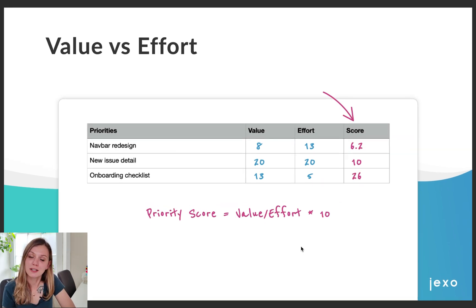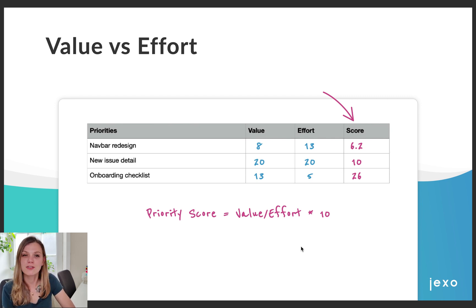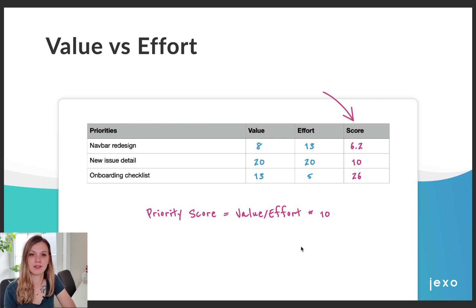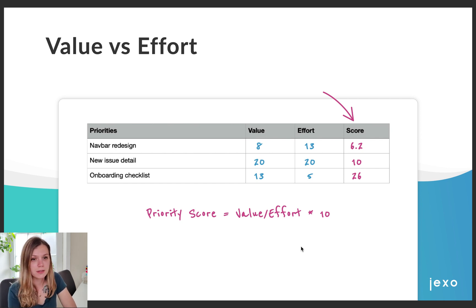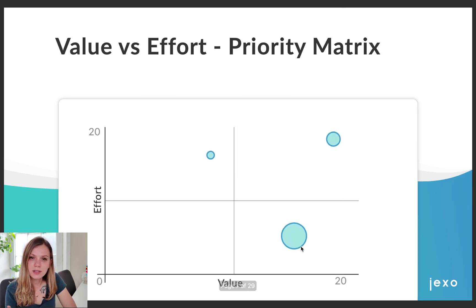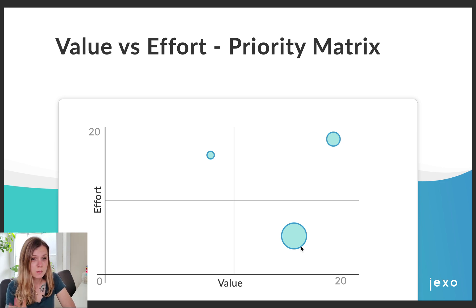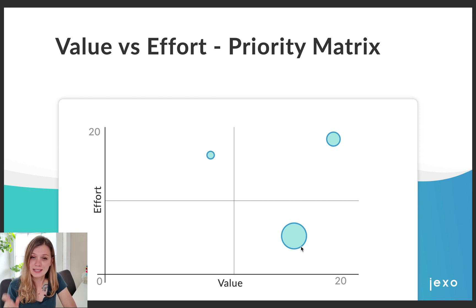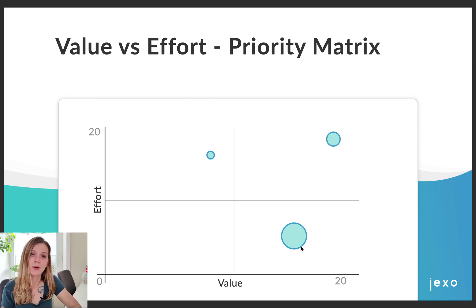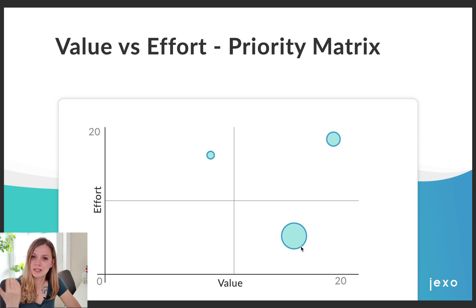Now we are ready to calculate the final priority score. In this case we simply divide value by effort and multiply by 10 to prettify the score. The higher the score, the more important the priority. You can clearly see which priorities to pick up first. But just looking at the score isn't always everything — to view your priorities from a different dimension, use the priority matrix. You can build it by placing the value metric on the x-axis and effort on the y-axis, where the size of the bubble represents the final score.